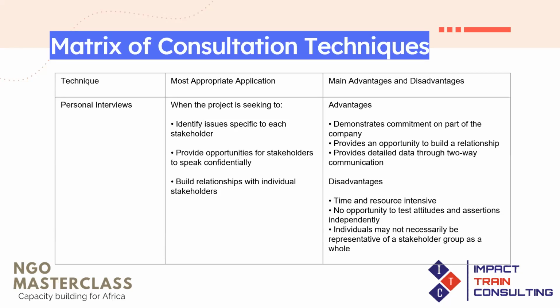One, it demonstrates commitment on the part of the company or the organization. It provides an opportunity to build a relationship with that individual, and also provides detailed data through two-way communication. But the disadvantage is that personal interviews consume a lot of time and resources, especially when you have a lot of stakeholders that you want to interact with.